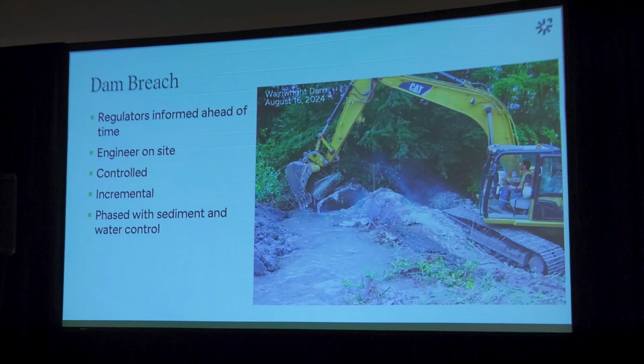So breaching the dam, this is one of those things that we need to be on site for as people doing oversight, and we need to not only be on site, we need to be letting people know ahead of time that this is going to be happening, because a lot of our regulators want that heads up so they can either also be there or they can anticipate calls that they might be getting about it happening.